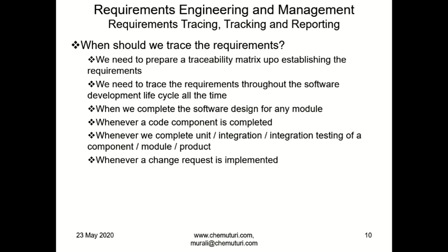When should we trace the requirements? We need to prepare the traceability matrix as soon as we establish the requirements. We need not prepare a traceability matrix until we establish the requirements. And once we establish the requirements, the traceability matrix must be prepared, and we need to trace the requirements throughout the software development lifecycle all the time.